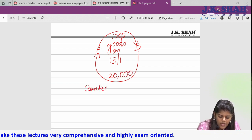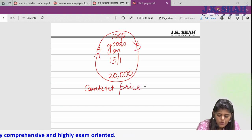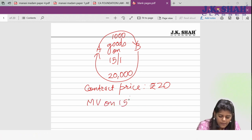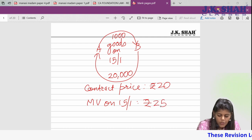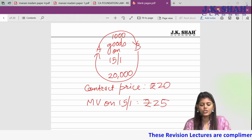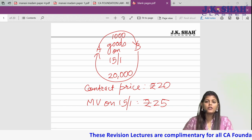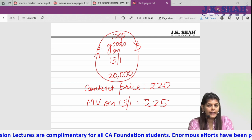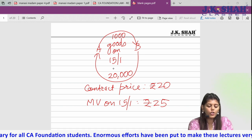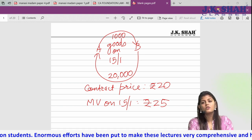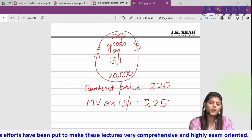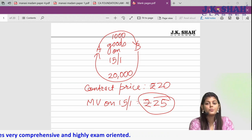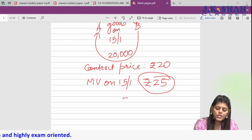The contract price per piece is 20 rupees. If the market value of these goods on 15 Jan was 25 rupees and there is an actual breach, you will be claiming 5,000. Because A did not deliver the goods, B will cancel the contract on the due date and buy the goods from the market at 25 rupees — paying 5 rupees extra per piece. So damages are calculated as 5,000.